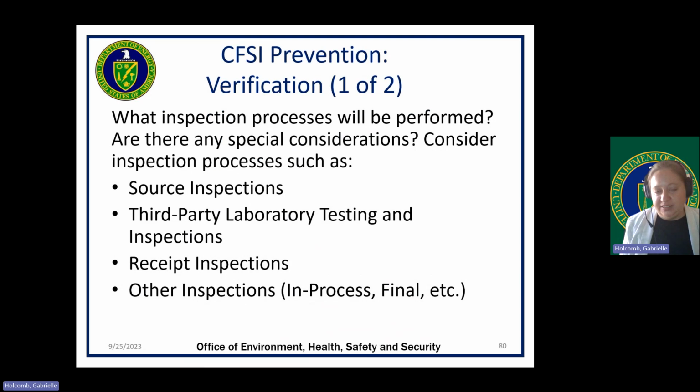And acceptance is the process of ensuring that items meet requirements and specifications and that they will be usable for their intended purpose. What inspection processes will be performed? Are there any special considerations? Consider inspection processes such as source inspections. Acceptance testing may take place at the supplier or purchaser's facility.